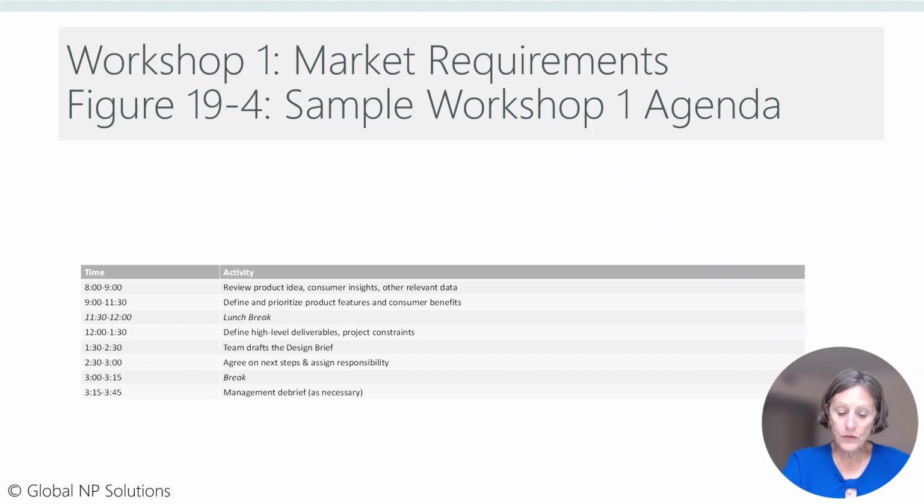In most cases, the chief engineer will select individual team members for the new product development project at this point. Lean New Product Development supports a process of people volunteering for a project to capitalize on their passions. Core team members should be committed full-time to the project, but at no more than 80% time allocation. However, the product champion may suggest specific people to assign to the project for career progression or with certain subject matter expertise. Early allocation of resources is critical to the success of a Lean New Product Development project so that people are available to work on the project as soon as possible. Waiting until a bookkeeping code has been set up is too late